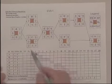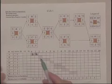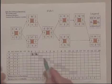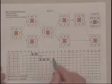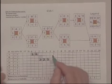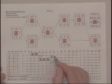So we go ahead and schedule C, which spans three weeks. Once that's completed, we can begin B, which only takes one week. Now we can do D since B and C are both done. And that takes one week.